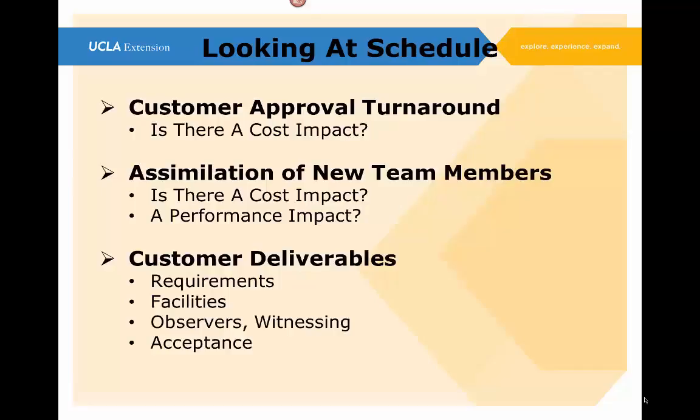Never works that way. The most recent project I was on, I often waited 4 to 6 weeks just to get the first review through. Sometimes I had to actually go after it and do some expediting on my own to get a document reviewed. So customer approval turnaround time, when you have an outside organization involved that's outside of your project, take a good, hard, close look at whatever those turnaround times are for whatever process they're going through, whether it's approval, reviews, whatever it is.